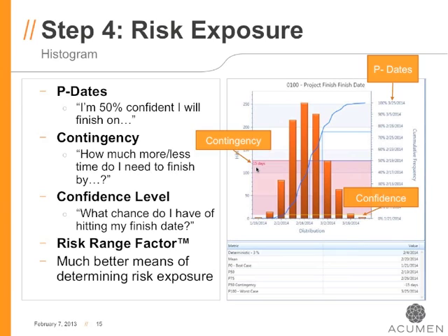Well, I don't think that's a very proactive way of managing risk. In many ways, it's covering yourself. You're just moving the goalposts. What I would advocate is don't buffer your schedule with contingency. Use contingency as an indicator of how much acceleration you need to achieve on the base schedule, so that if the risk happens and that 15-day risk exposure hits, and yes, it can hit, because you've accelerated and compressed your schedule, you'll still achieve your target date. So don't think of contingency as a magic bullet. In fact, it's not. It's just a buffer.